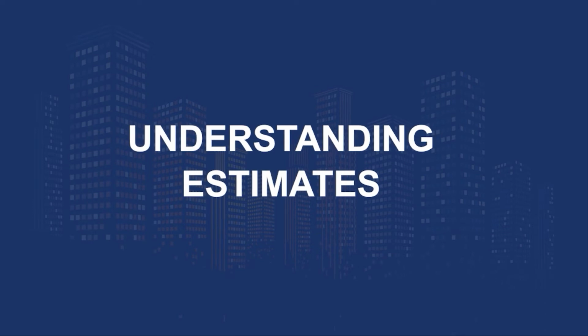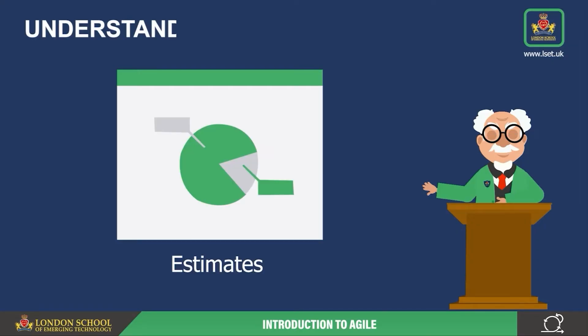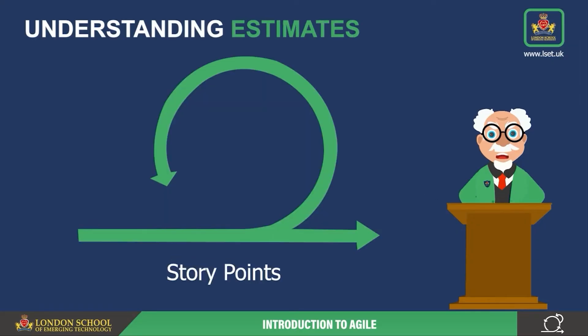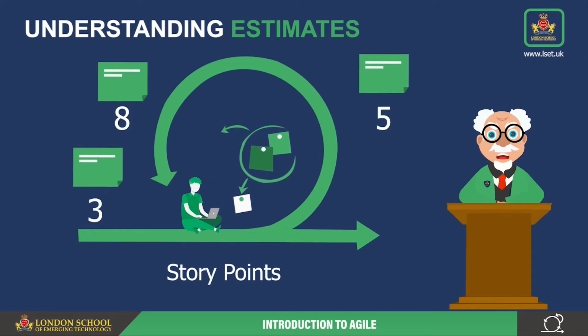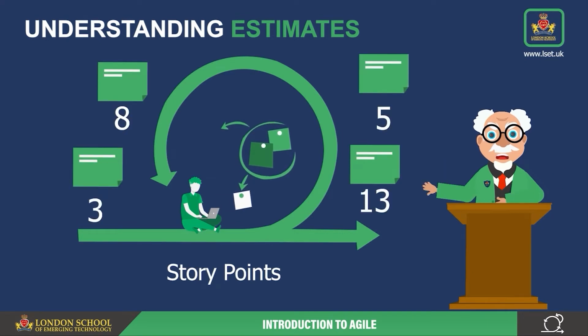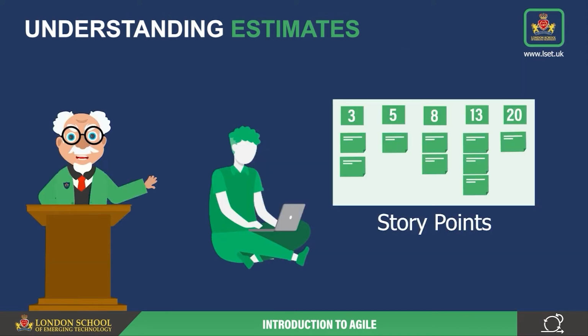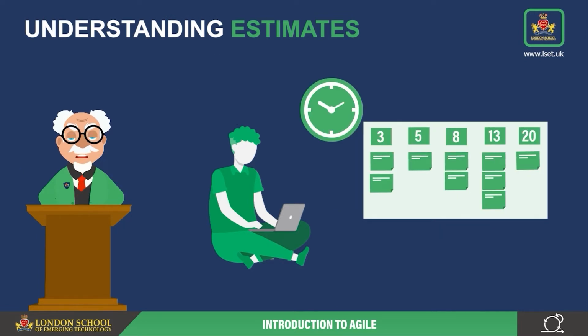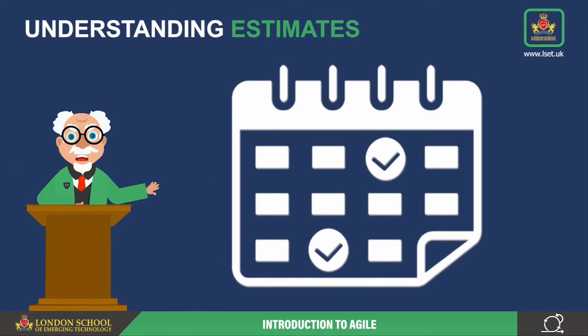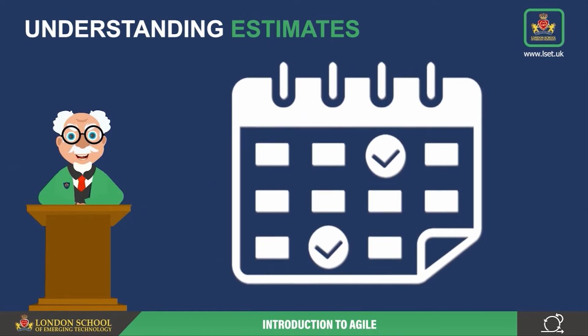Understanding estimates. Here's a quick note about estimates. Good estimates can be created using a variety of techniques. There are some people who prefer estimating in story points. Sadly, story points don't answer the question: what is the timeline for my project? It has been our experience that estimating work in hours is the best method. It is important to use some standards when estimating.